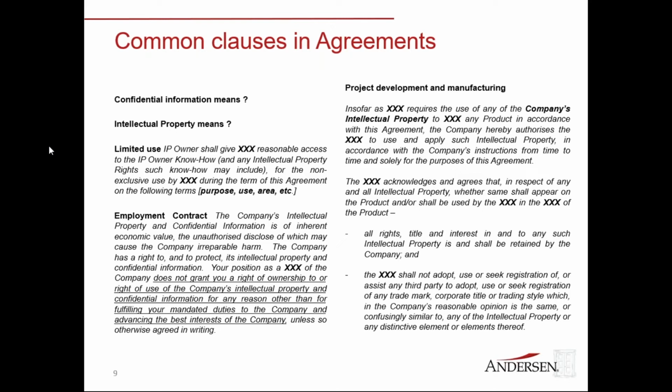It is also important to deal with how the relevant IP should be treated pending the outcome of a dispute relating thereto. So obviously, if somebody wants to allege a breach, what do you do pending a decision on who owns that IP? So this will depend on the relevant IP. But if, for example, the IP is required to be used by the other party, and withholding such IP would cause damage, it can potentially be agreed that a license fee should be paid into an interest-bearing account pending the outcome of the dispute. If the owner is ultimately correct, then the accumulated fees plus the interest must be paid over to the owner. If, however, the other party is successful in proving ownership, then the accumulated fees and interest can be paid to that party.